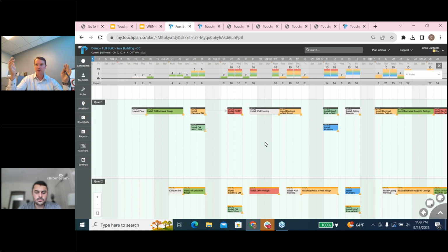at a high level, we probably saved one position on the project, which would just be that person, that runner, that's going and picking up those Excel spreadsheets, those weekly work plans, and then putting them into the computer, running all the calculations, and then giving the feedback to the superintendent. That's a lot of work when you're talking about this many tasks across this many trades on a large project. If you can keep it all in a packaged up, clean software system that can give you those reports at just kind of the click of a button, you don't have that individual as the runner or as the data warehouse, for lack of a better term. You've got Touchplan.